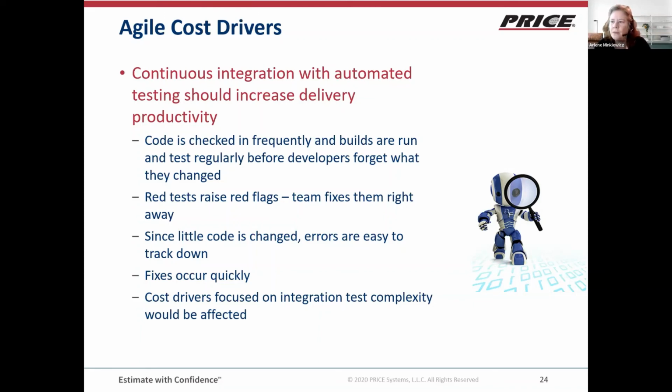And what's good about that is, little code has changed because you're running a build once a day or twice a day or whatever. So only part of the team has checked in new code. It's easy to identify it. The developers still remember what it is they did and why they did it. Fixes occur quickly. So for cost drivers focused on estimating the integration and test effort, the complexity of that integration and test effort goes down, as compared to a waterfall situation where 6-8 months transpire before all the code is brought together and tested.